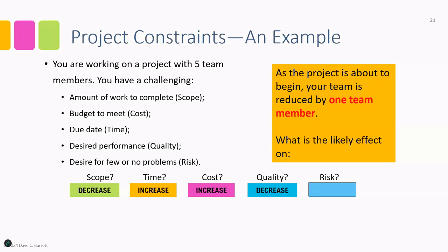Now, finally, if we reset everything back, what would be the effect on the risk? Well, hopefully it will become fairly obvious that our risk level goes up. If we're really taking chances, if we're really rushing, or trying a new innovative approach that's never been tried before, we're going to roll the dice. It'll increase the risk potential, the possibility of something going wrong.